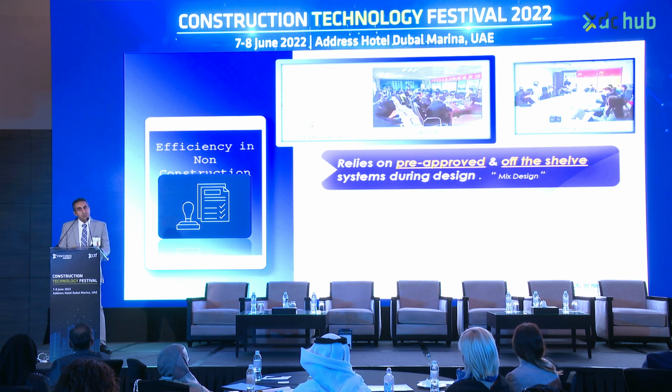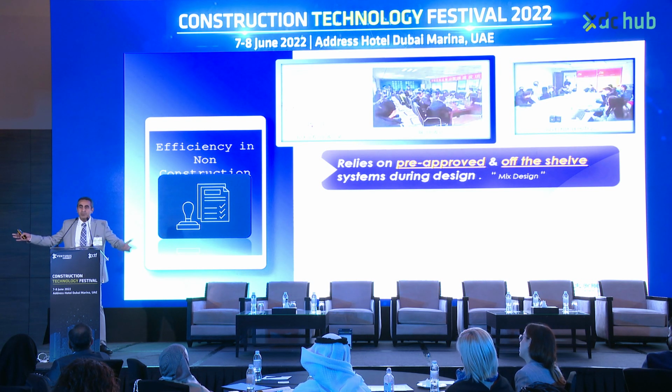Then this design needs to go to authority to approve it. No. Before we go to authority, a third-party checker needs to check it. Then it goes to the approver. Once approved, does the authority take the liability of the design? No. Liability of design will remain with the engineer who did the design at the beginning, although two people check after him. Then, good, we have the design approved, we give it to the contractor to start building.